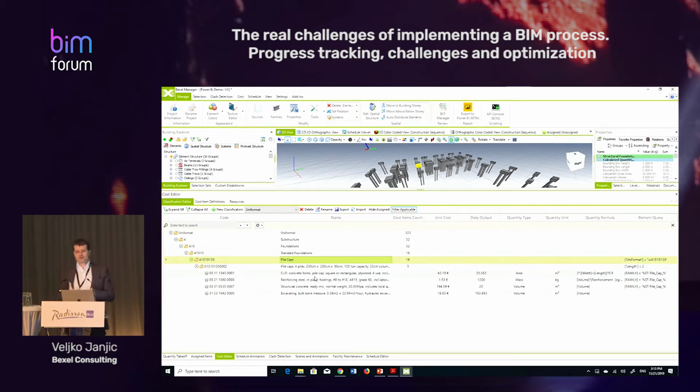So when you do that only once and you have similar projects, our experience is that 90% of the cost items are the same. I remember from Stanford, a guy from the NCC company was presenting the number of cost items, or recipes, they had at that time. On 97% of all their projects, they are using 1,700 assemblies, not more than that. And this is, again, another story about standardization, vertical integration. Just to mention one word.